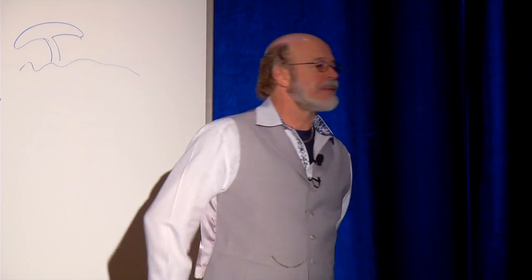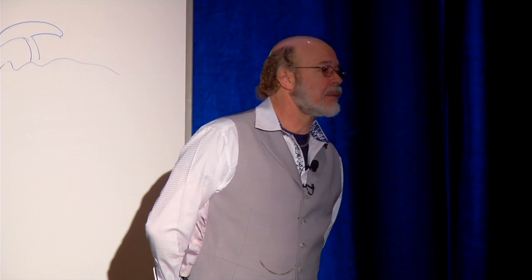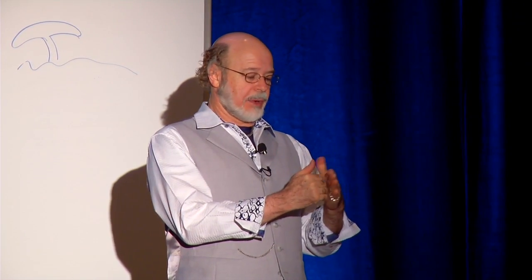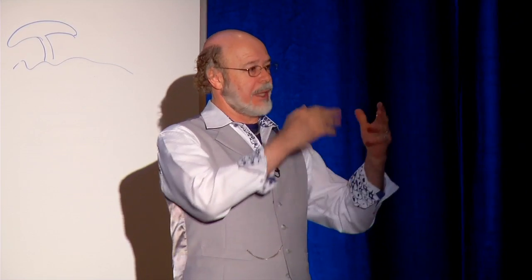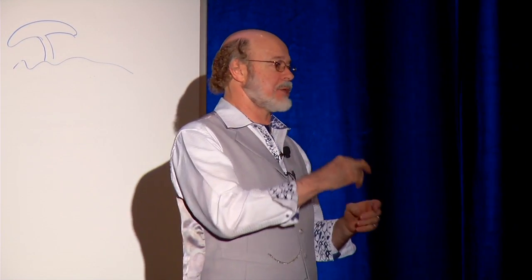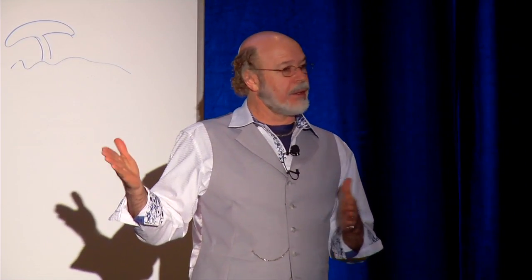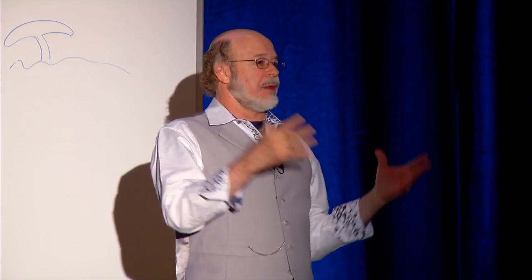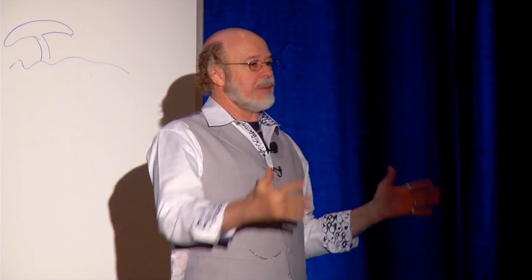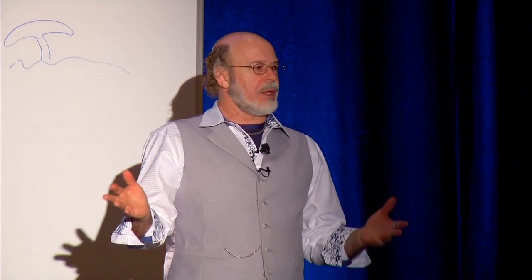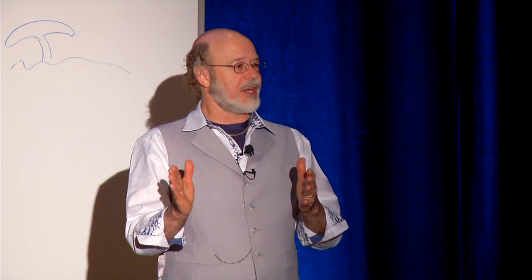Yes? What about your Division 0 procurement requirements and things that they may need to go back to the owner for? We actually have a document that's broken out even more. Yes, we have the checklist, and all the questions that need to be answered are in the checklist that the project architect gets. But what I sat down and did early on with the project architects was ask, what kind of dialogues do you have with your owner, and when do you have them? And so we created a whole separate little document that's called the owner's checklist.